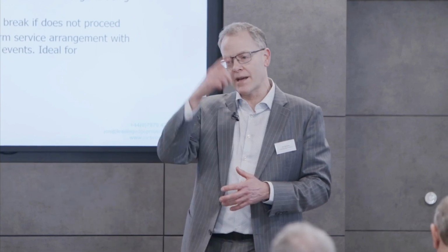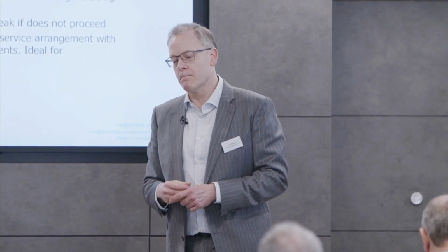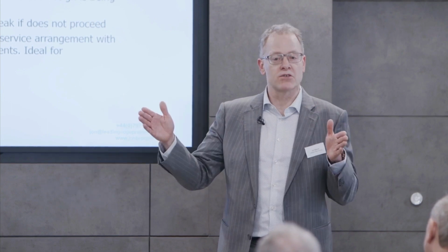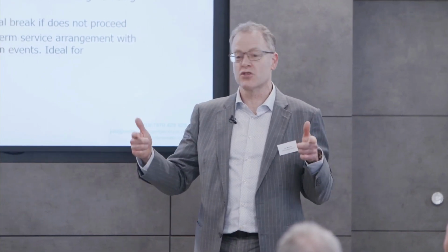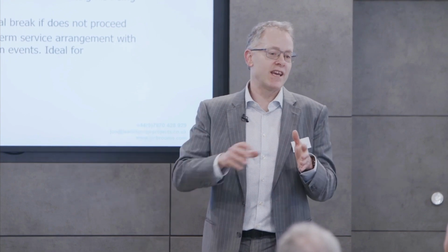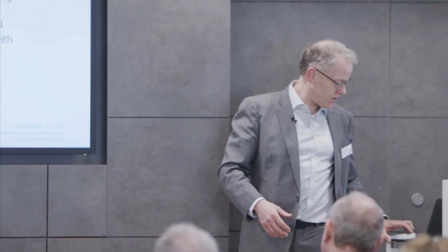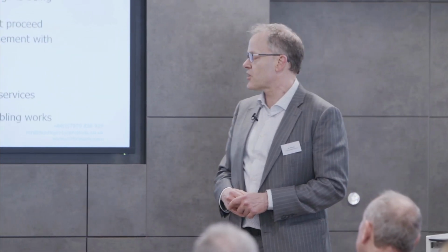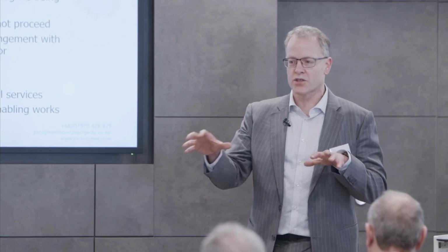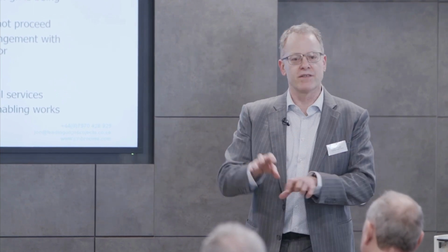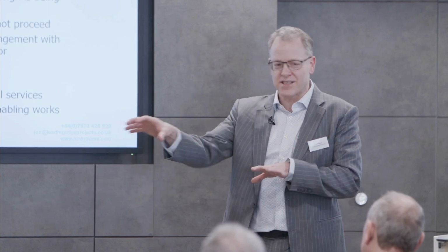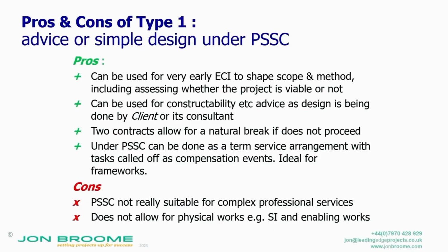So for Connect Plus, who run the M25, they're one of my clients, we have an annual professional services contract. Why is it annual? Because rates go up with inflation, and then during that year we can just instruct a separate task. But what are the cons? The cons are it's not really suitable for complex professional services where you've got lots of professionals who have competing demands and they need to be managed and organised, where one decision is dependent upon another, etc. And it does not allow for physical works. The professional services short contracts do not allow for site investigation or enabling works.